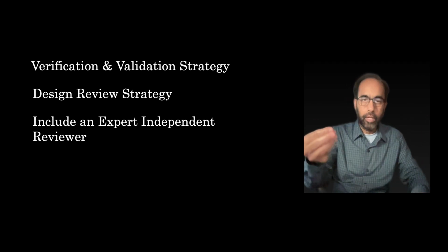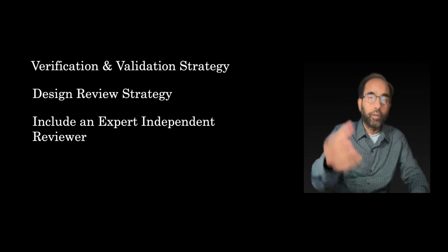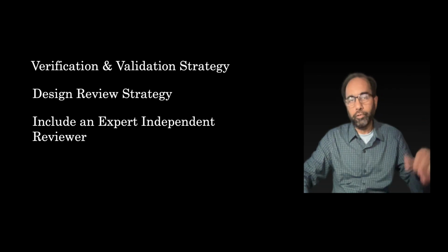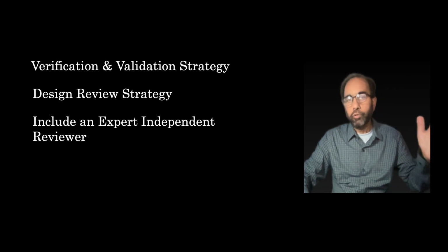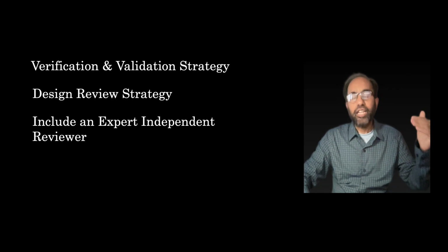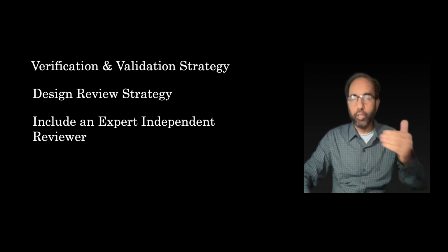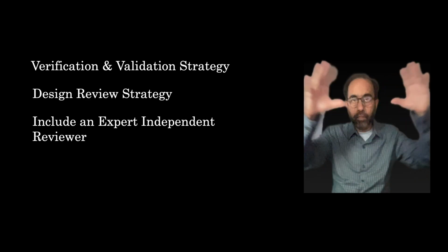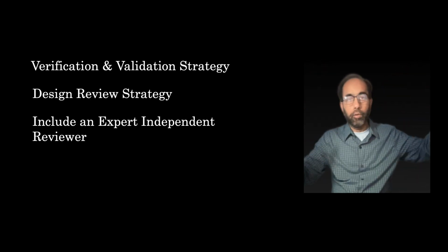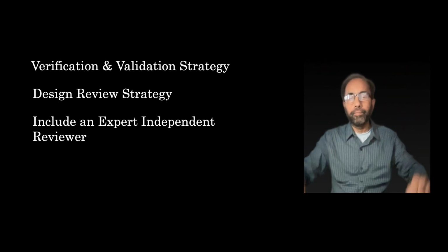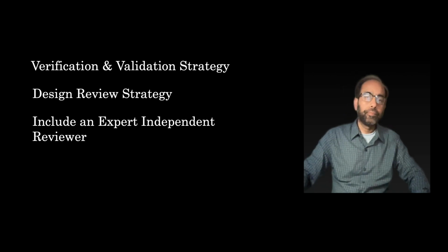This is a critical regulatory requirement that you perform design reviews. It is also important that you have an expert, independent reviewer who can review it from a systems perspective, somebody who understands the overall system, where you started, where you are going, and everything in between.